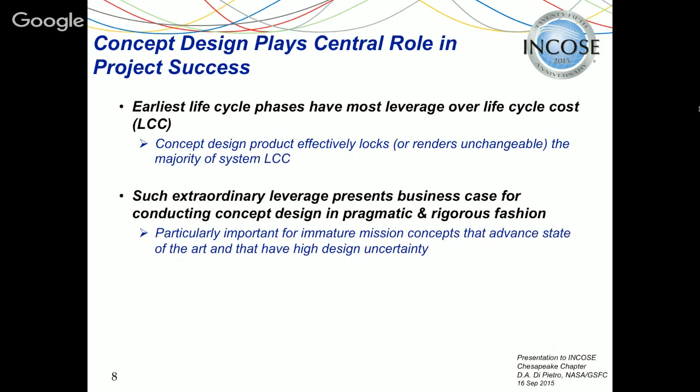Okay, so concept design plays a central role in project success because its product effectively locks or renders unchangeable the majority of system lifecycle cost. Now that's extraordinary leverage, and it presents a business case for conducting concept design in a rigorous and pragmatic fashion, particularly for the kinds of projects we're talking about here. First of a kind, cutting edge technology.